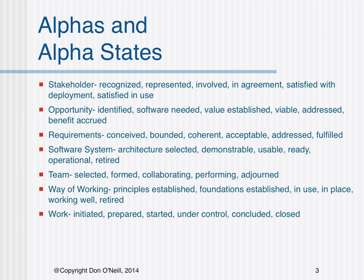More specifically, the alphas and their sequential states include: Number one, stakeholder — recognized, represented, involved, in agreement, satisfied with deployment, satisfied in use. Number two, opportunity — identified, software needed, value established, viable, addressed, benefit accrued.